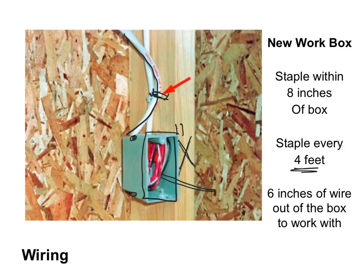In residential construction, after the wiring is done and before the drywall is installed, a home inspector will come and inspect the house to make sure the electrical wiring has been done correctly. Electrical wiring is regulated by codes and regulations of the electrical trade, and the inspector will verify compliance. If errors are found, you'll have to fix them, which might delay the construction schedule. Having straight, neatly run wires that properly enter junction boxes shows the inspector you care about your work and are doing it correctly.